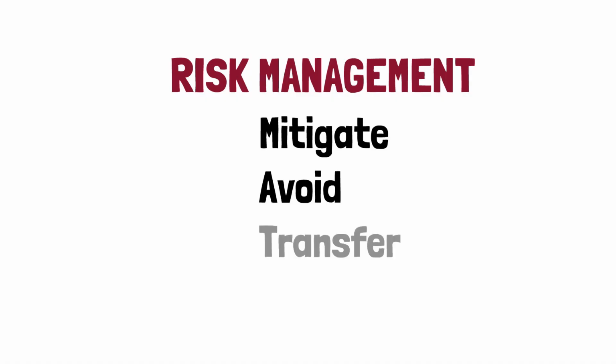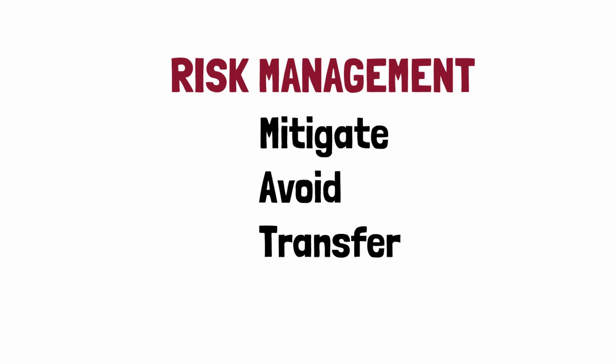Or transfer the responsibility for the risk to someone within or outside the project. This will decrease your liability, but also decrease your level of control too. You can also accept that the risk could happen and choose not to act at all. This is the best approach for risks with low probability and impact ratings.